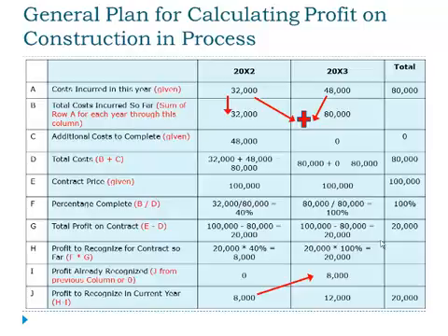In row I, I write down how much profit has already been recognized. In the first year, nothing was recognized previously, but in the second year, $8,000 had already been recognized. Then I subtract out the amount that has already been recognized to find what needs to be recognized this year.